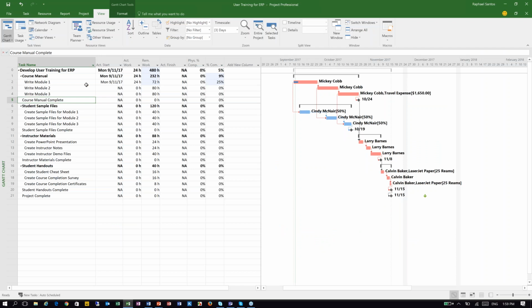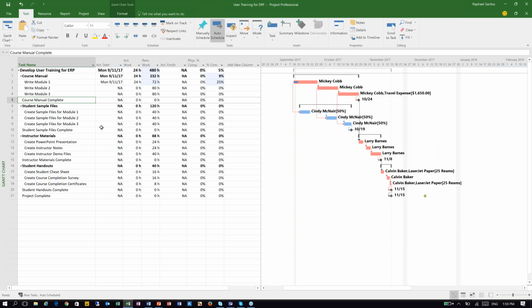I know that we should be finishing all the tasks in order for the milestone to be completed, but let's assume that the tasks have been finished. So as soon as I click here on the cursor, manual complete, I can just mark the milestone as complete, and then I will have my actual start date, my actual finish date, and my percent complete, all of them done. So this is the way that we recommend you using your project and tracking the progress on your project.